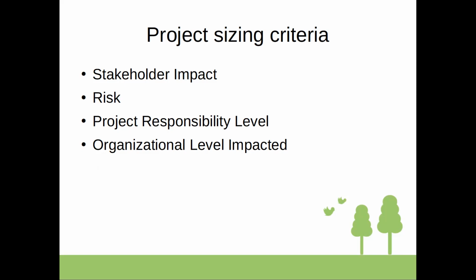But as you mentioned, regarding doing statistical analysis and reviewing previous cases, that's going back to the archived information from previous projects, basically to understand what the cost would be for this new project: how much time the people will spend, how much effort is needed, how big a group of people is needed in terms of resources. So that's also an important part, going back to the prior art, previous documentation, and making decisions based on comparison.